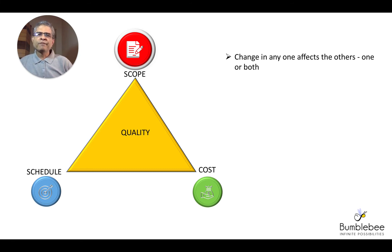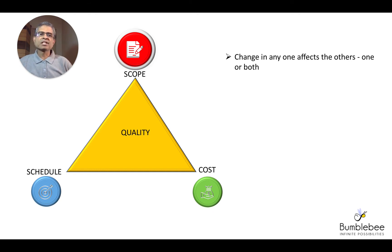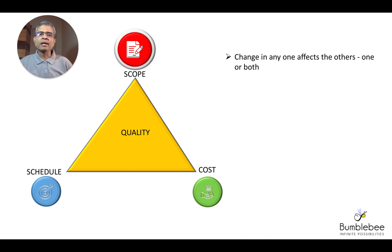For example, if the customer brings in new scope or new functionality to the project, then both the schedule and the cost are likely to be impacted. It is not possible to deliver the same scope without any change to the schedule and cost without affecting the quality. The team might decide to deliver at the same cost and same schedule, but then it would be a rushed job and it will impact the quality of the output. So keep in mind that quality is also a constraining factor — the fourth dimension.